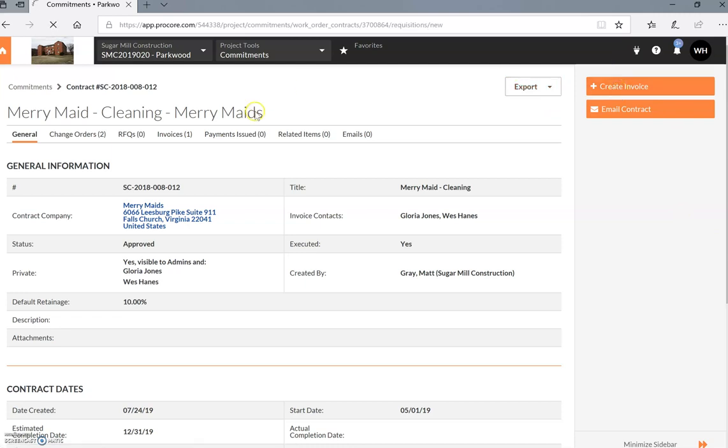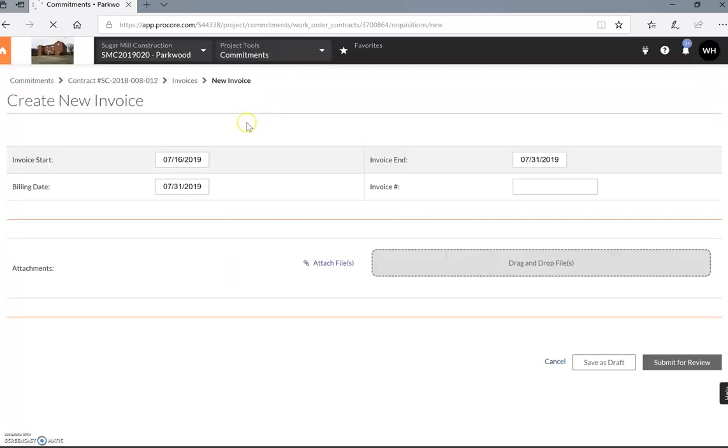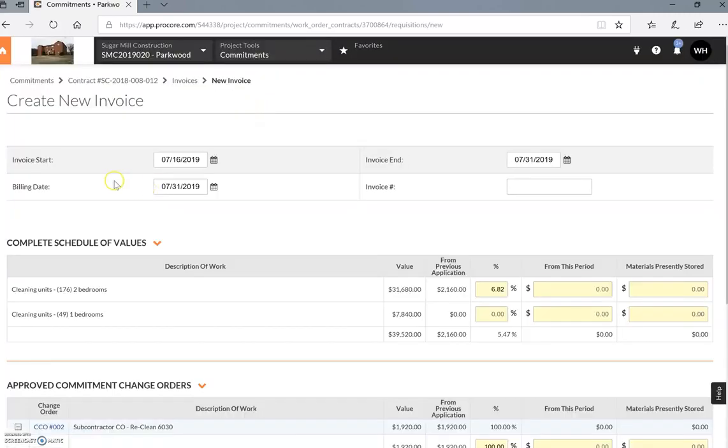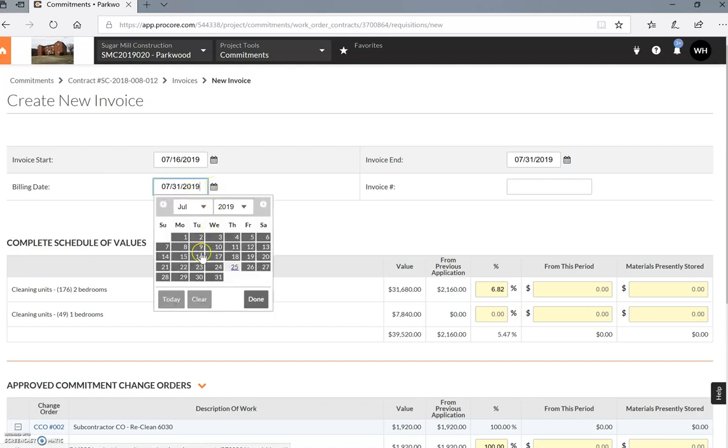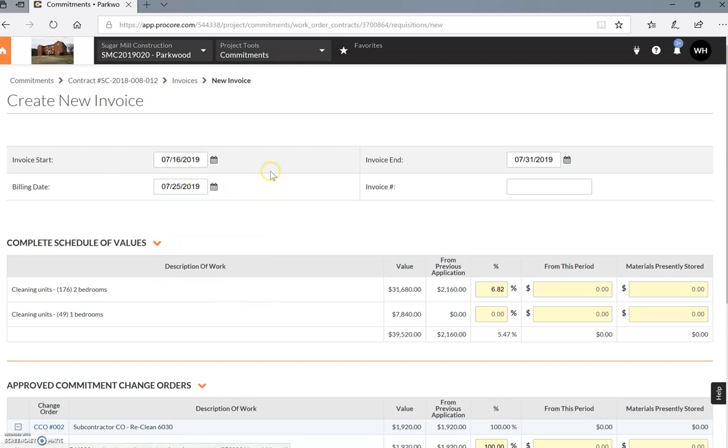You're going to choose the invoice start date, which for this period it's a little weird because we did a half a month, but it will typically be the first of the month through the 30th or 31st. This is actually the billing date, which is the 25th, and the invoice number is your second invoice.